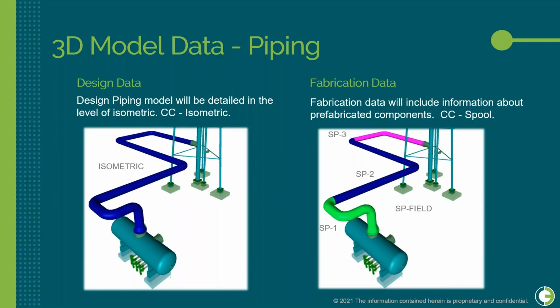On-build construction component data model allow user to add additional information to the design object and then group them as the construction object and use them in the work packaging as available in the site.